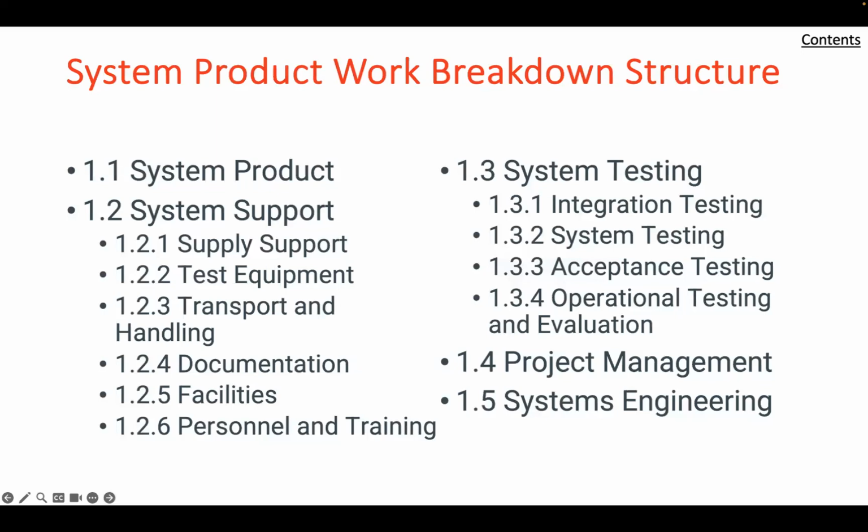Moving on with a few more considerations for cost control and estimating, the WBS is the heart of the project cost control and estimating system. Its organization is arranged so that the lowest indenture work packages correspond to cost allocation items. Thus, at the beginning of the project, the target cost is distributed among the identified work packages and is partitioned down as lower level packages are defined.